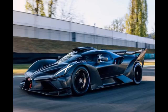4. Powertrain drivetrain. Source and purchase a top-of-the-line, custom-built racing engine block and cylinder heads, exceeding typical pro-modified specifications for unmatched horsepower output. $45,000. Select and acquire a racing transmission capable of handling the monstrous power output of Wayne's engine, reinforced with custom gear sets for unparalleled durability. $20,000. Purchase a heavy-duty, custom-built rear-end assembly specifically designed for pro-modified drag racing, featuring ultra-lightweight, high-strength components. $25,000. Total powertrain drivetrain costs, $90,000.